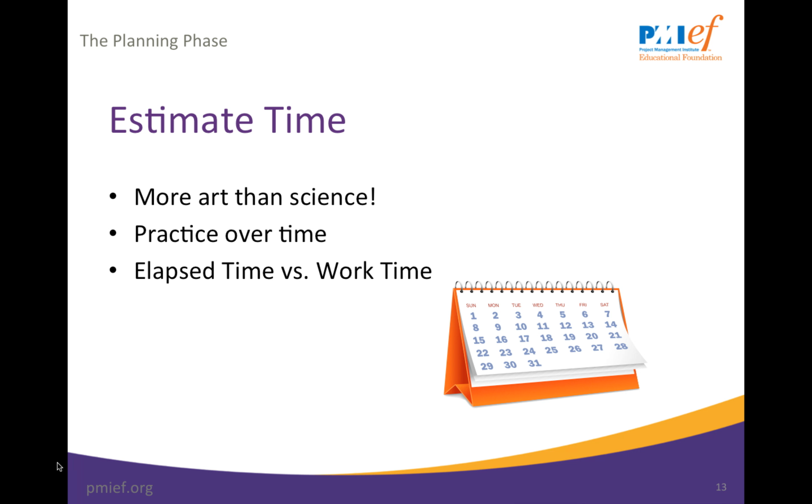Work can often be reduced if additional people are available to help on the project. Most projects are planned with some contingency time built in. This can be added in as a percentage of time for each activity, or some additional time allotted for each deliverable.